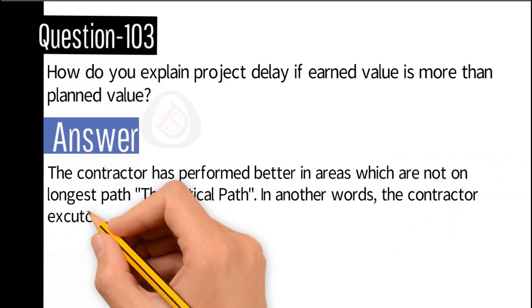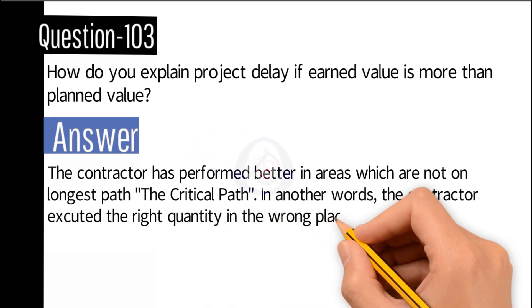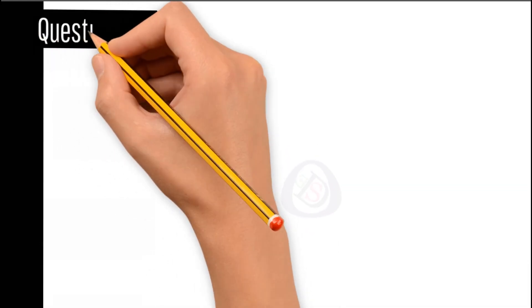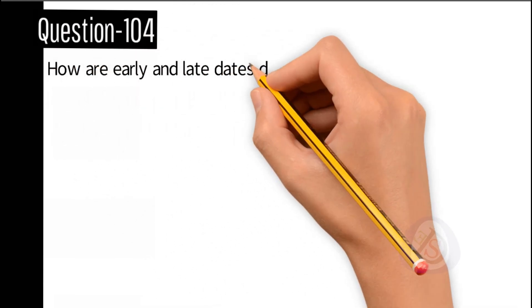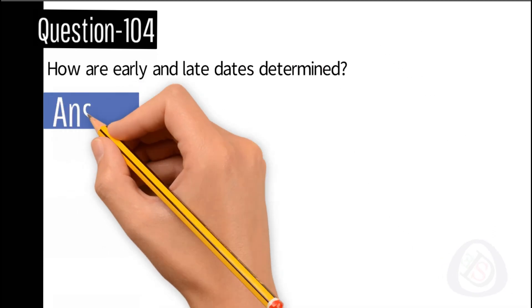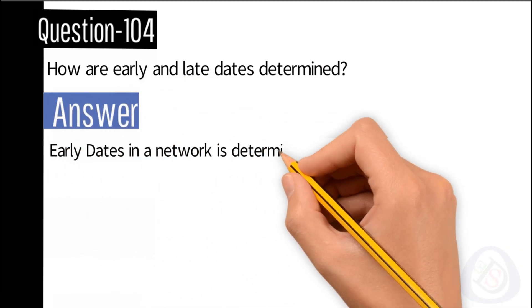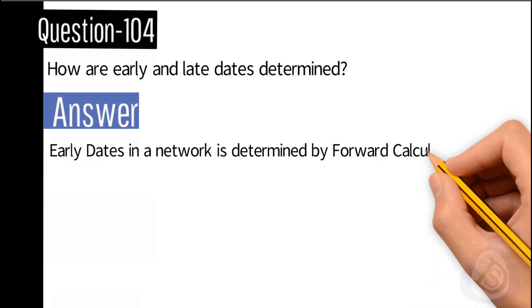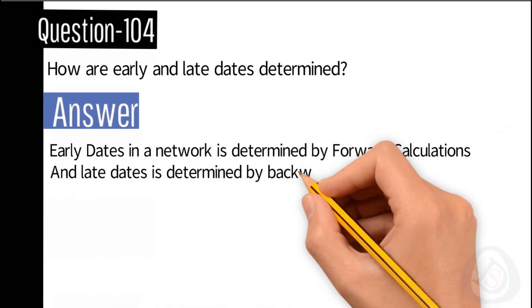Question number 104: How are early and late dates determined? Answer: Early dates in a network are determined by forward calculations, and late dates are determined by backward calculations.